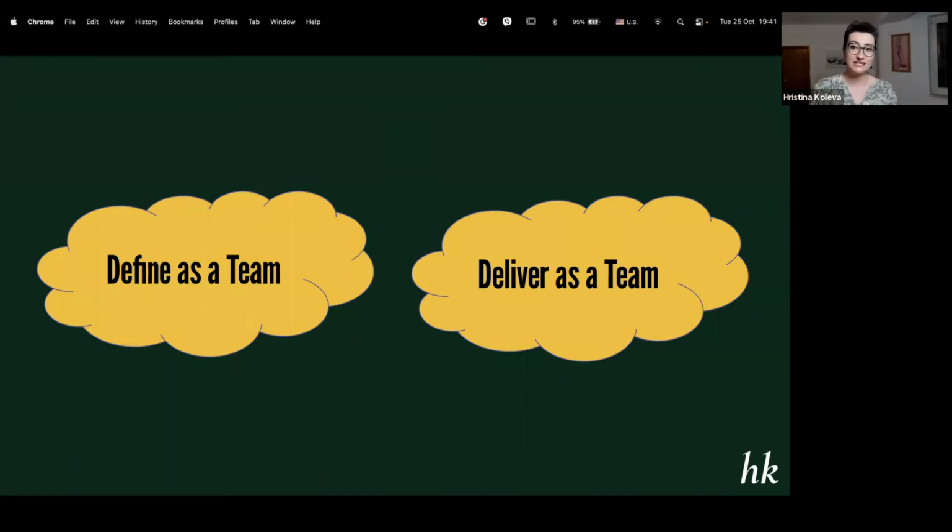The refinement meetings are not enough. You need one hour dedicated to each story to really understand what the story is about, how it's going to be implemented, what we need, how we are going to test it, what can go wrong, and whether we have everything in terms of information, people, resources, data, etc., to deliver that story.